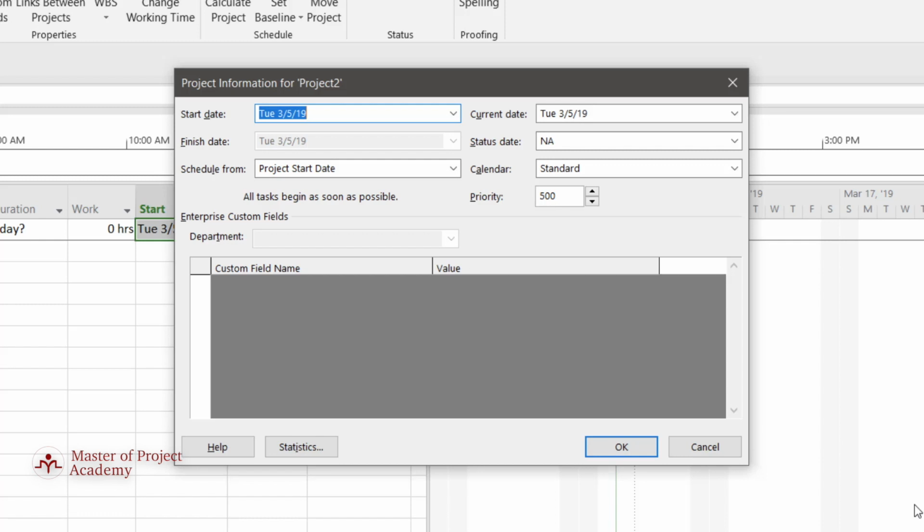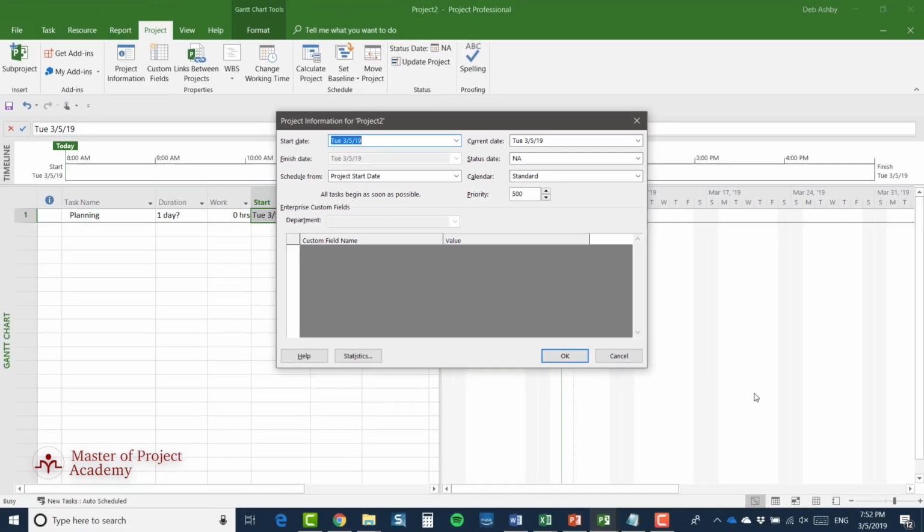The approach we're taking now with planning this wedding is that we're starting at a start date, and when we've done all the planning and got all the other activities in, we'll know when we can be ready by. So we haven't got a date for the wedding yet. We need to do a lot of planning first, but we will find out when we would be ready to have the wedding by. So let me cancel this dialogue for now.